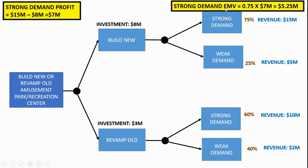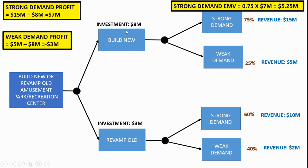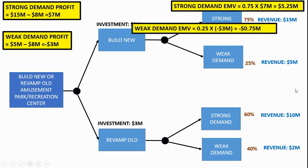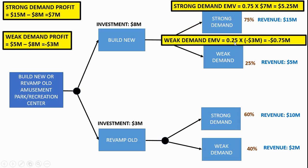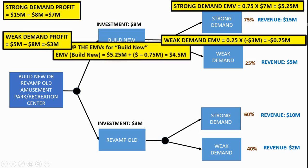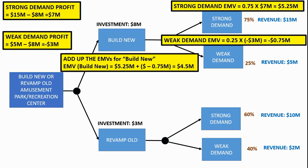Now we need to find the EMV for the weak demand. We do the same thing — subtract the investment from the revenue and we get minus $3 million. Then we multiply the probability of 25%, which is 0.25, times minus 3, and we get minus $0.75 million. Then we add the strong and weak demand numbers together, and that will be our total EMV for the build new branch. If you do that, you come up with a $4.5 million EMV. So that's the EMV for build new.